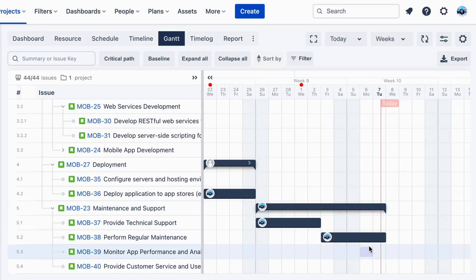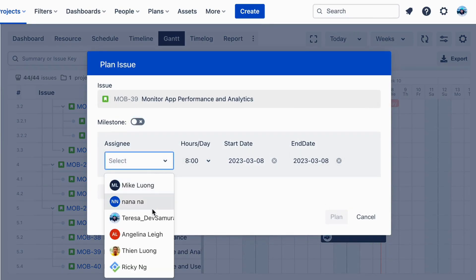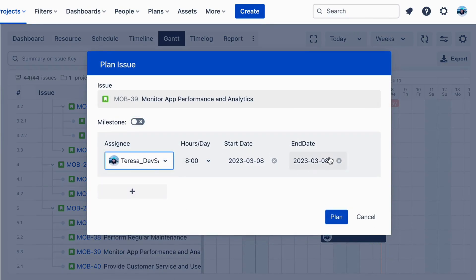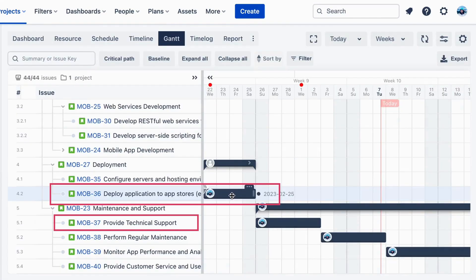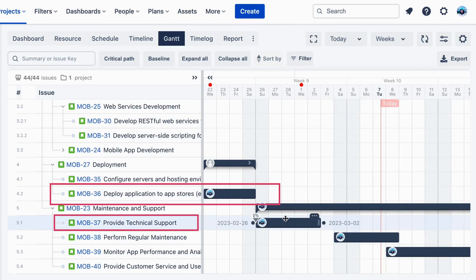Each task has been assigned a duration and a start date, and dependencies between tasks have been identified. For example, provide technical support cannot start until deploy application to app stores is completed.